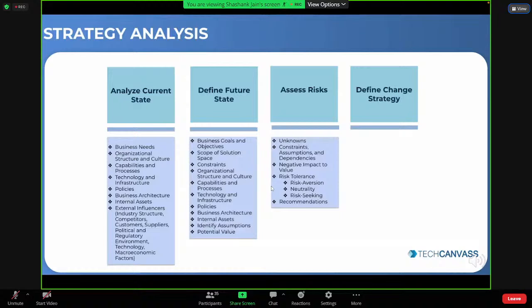You can also set up a risk impact scale, whether the risk may have low impact, medium impact, or high impact, and how you are going to treat that risk. There are different ways to treat or address a risk. You can avoid it totally, where the source of the risk is simply removed. You can transfer it to someone who is expert at handling that risk. You can mitigate the risk by reducing the probability of how often it happens. Another way is to accept it, which means deciding not to do anything about the risk. Or it could be about increasing the risk, as you see a possibility of high returns. So that's one of the important techniques for assessing the risk: risk analysis and management.